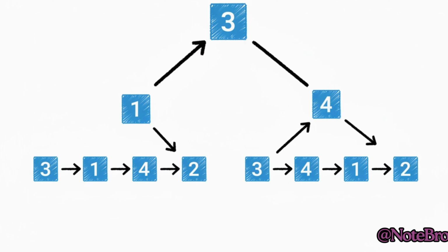Take a look at this example. Task 3 has to happen first, and Task 2 has to be dead last. But once you finish Task 3, both Task 1 and Task 4 are totally ready to go. Neither one depends on the other. So you could do 1 then 4, or you could do 4 then 1. Both of those are perfectly valid sorted lists.